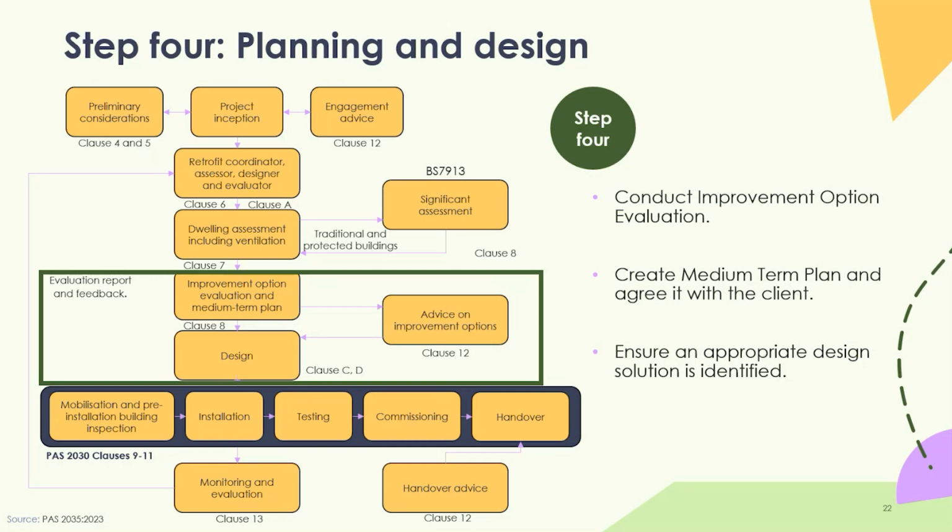You might have plans for a respite centre where elderly people, who normally stay at home, can go while works are going on. There might be a community centre or a library or some other place where you can set up a respite centre during particularly disruptive parts of the works to help alleviate that for people who want it. There are all sorts of other ways you might be able to help in those situations, but you need to be taking those issues into consideration with your resident engagement officer and really understanding what kind of things would be appropriate.